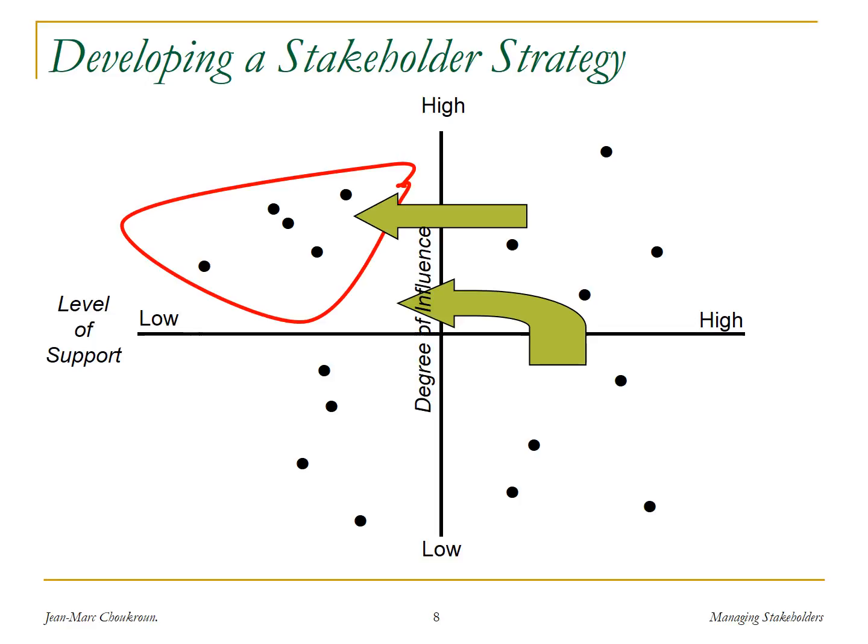So you get a scattered diagram like I've shown here, and again circled in red are the critical people that can really in effect kill the project, the high influence, low support. And the two big arrows mean that you want to use the upper right, the high, as the source of influence over those people on the left. That's the straight arrow here. Use those high support, high influence people to influence the low support, high influence group.